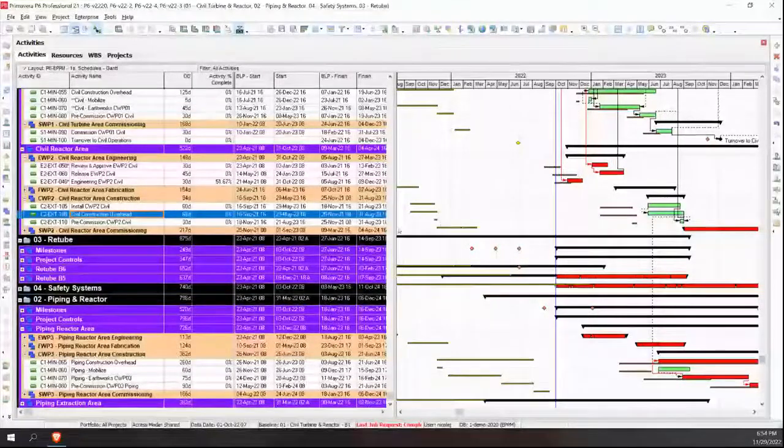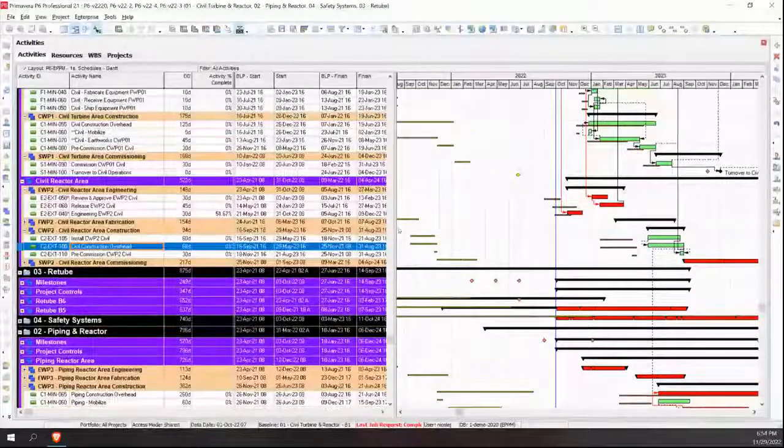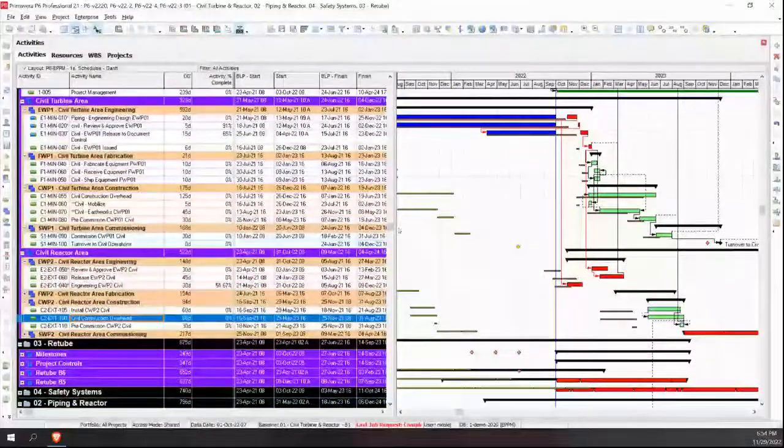Okay, now, in terms of P6, in terms of other fantastic features, in terms of modeling, we have a lot of different types of activities that we can model, meaning what is going to control when you start updating. So we have the ability to model activities that are fixed budgets. So I have only so many man hours that I can use, or a fixed duration, meaning I have to get it done in 20 days because that's my commitment.